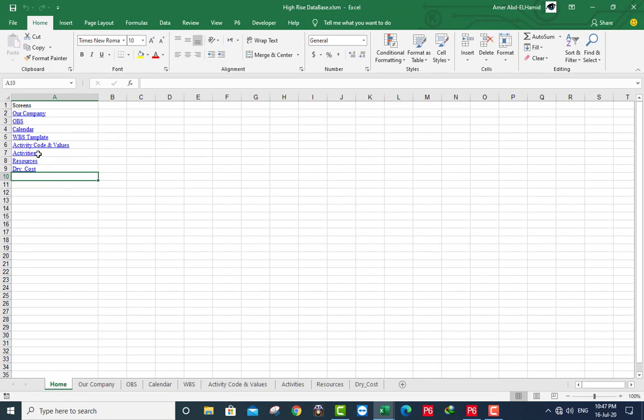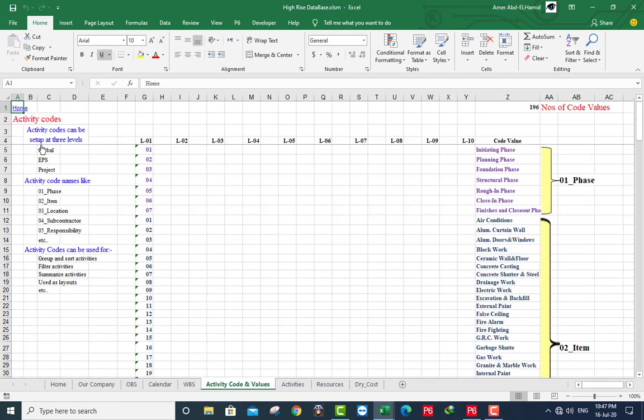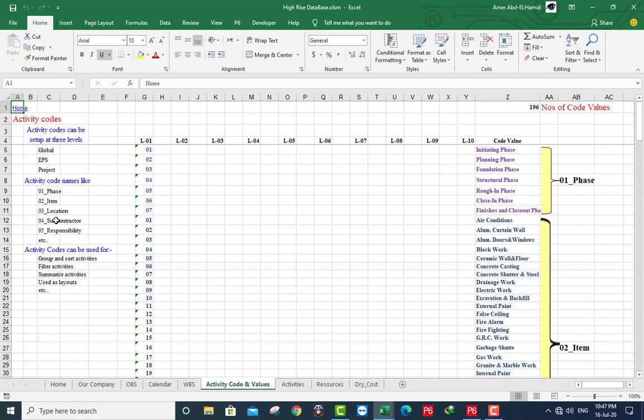Go to activity code and the values sheet. Here activity codes can be set up at three areas: global, EBS, and projects. Activity code names could be phase, item, location, subcontractor, responsibilities, etc., or you can make your own activity code. Also can be used to group and sort activities, filter activities, summarize activities, used as the layout, etc.